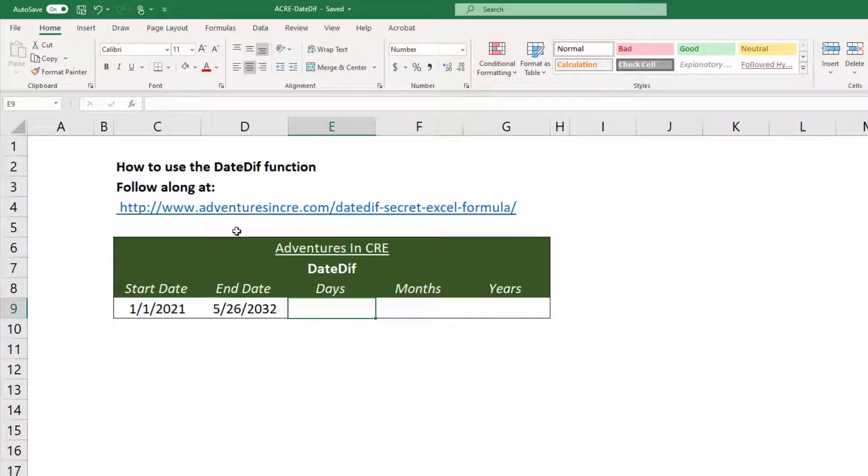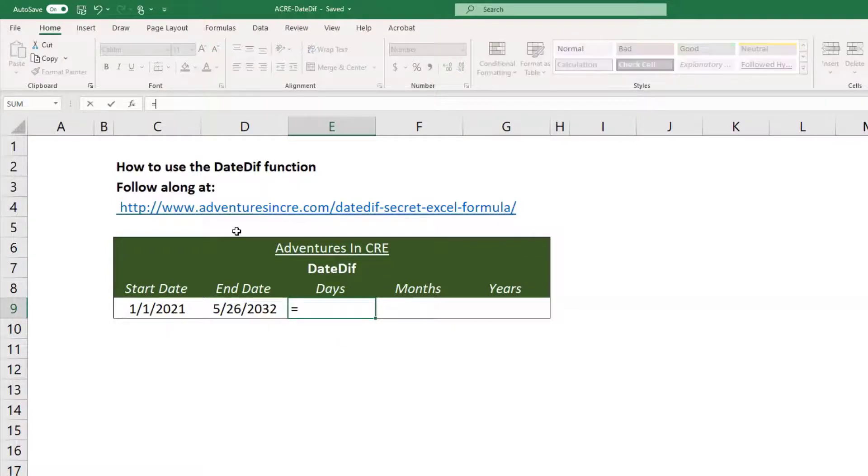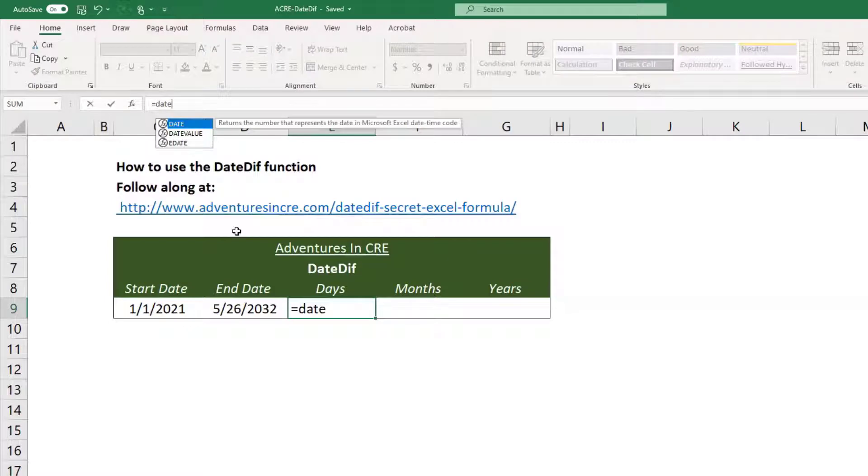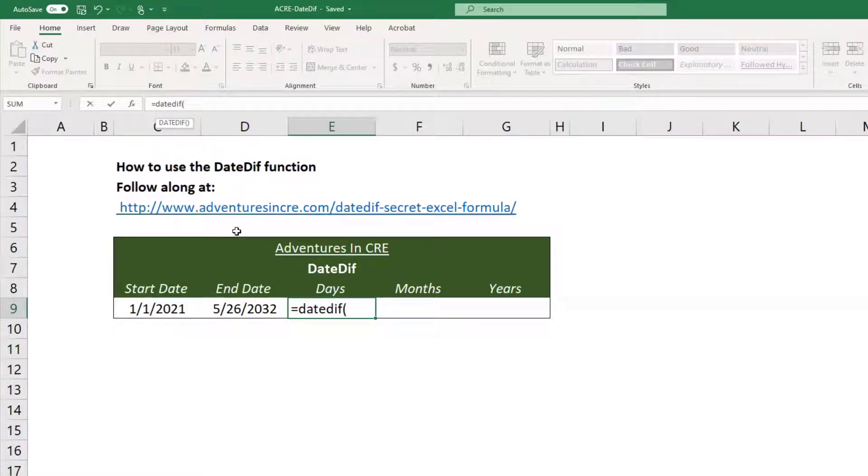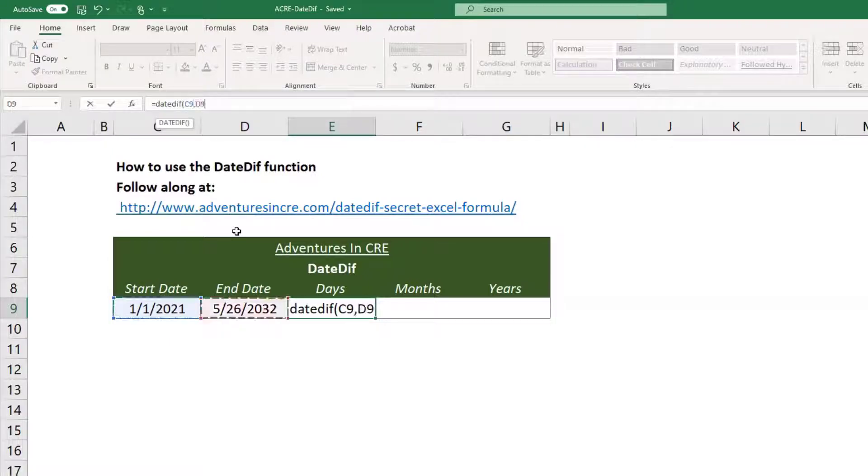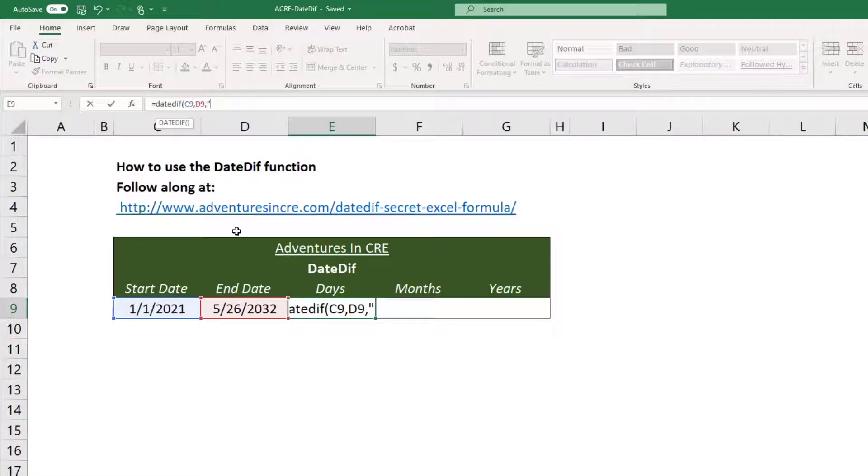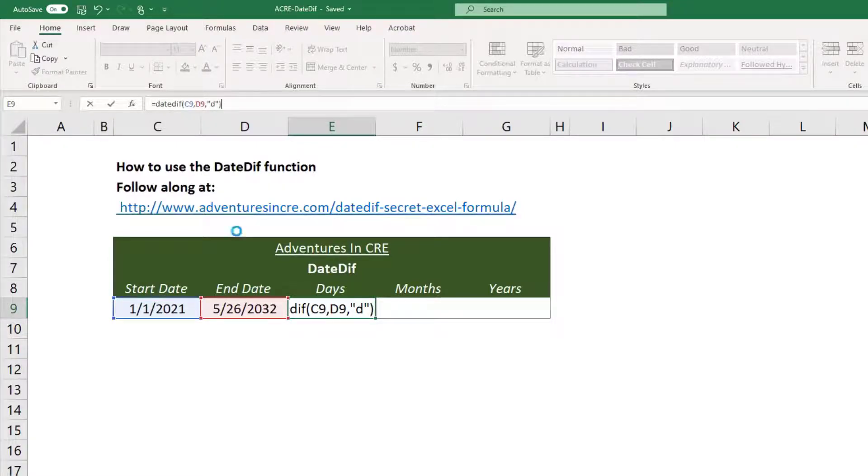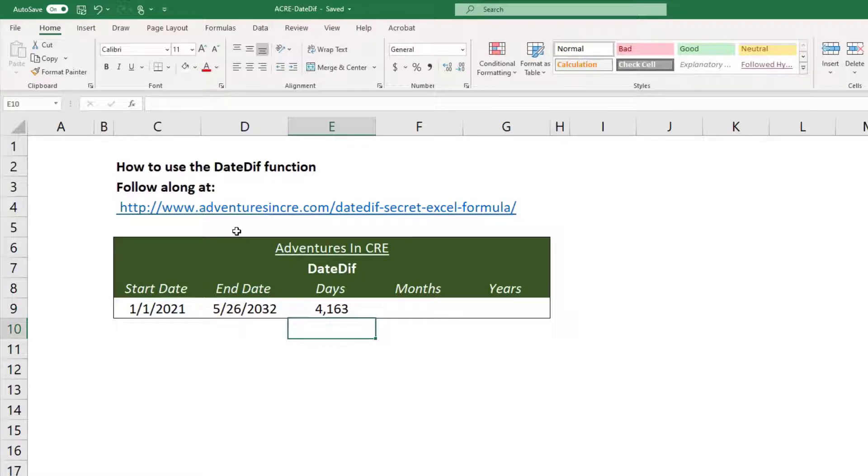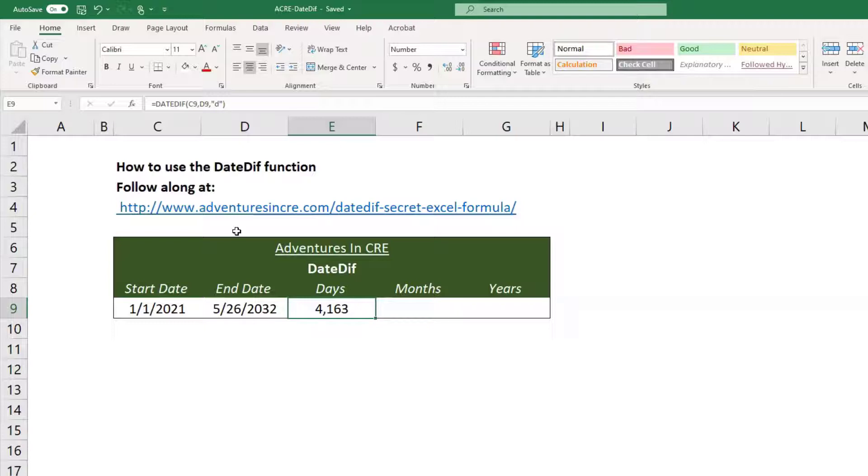All right, so if I want to know the amount of days between these two dates, I type in equals DateDiff, open parenthesis, and then the first thing I do is I go to the earliest date, comma, then I go to the ending date, and then if I want to do days, I'll do in quotation marks, open quotations, I'll type the letter D, close quotations, and then I'll close it. So this will be 4,163 days between January 1st, 2021 and May 26th, 2032.